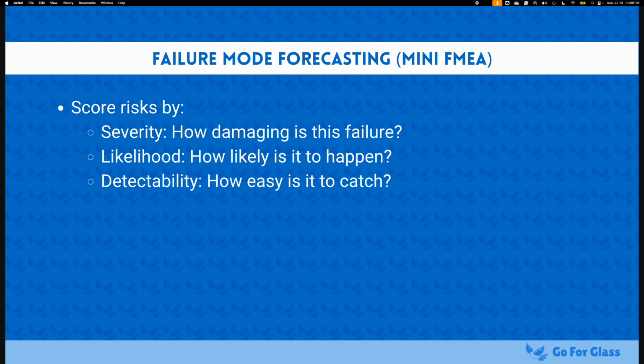But at the end of that, once we've sort of listed every realistic way our project can fail, we're going to then multiply the scores or use a weighted approach, whichever works best for you, to find the most critical risks. Personally, I just do a 1 to 5 scale again. It just makes it easier for me. I can have it all in the same Excel spreadsheet. I can put it through a basic formula. And then, while in an ideal world we will prepare for everything, this is going to help you understand where to focus your mitigation efforts.